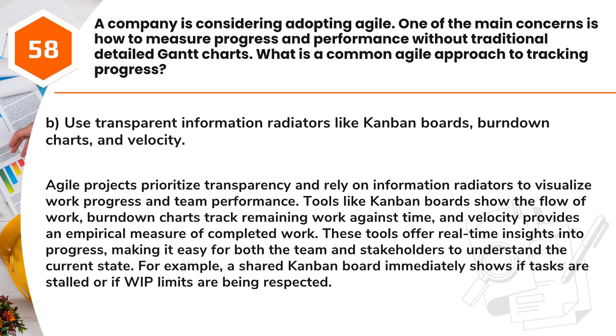These tools offer real-time insights into progress, making it easy for both the team and stakeholders to understand the current state. For example, a shared Kanban board immediately shows if tasks are stalled or if WIP limits are being respected.